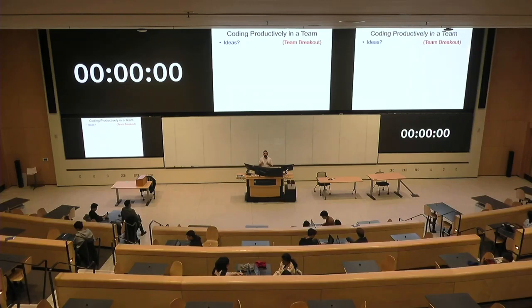So one of the most basic things is to communicate. Make sure that you are meeting regularly, to understand what each team member is doing, and have an agreement on the task allocation up front. Now, we are working in an agile environment, so sometimes planning is hard from the beginning. But if we have a little bit of planning, a little bit of an idea of what each team member is doing, we can revisit this in a week or two, once we're approaching the deadline, see how things are going, and then reiterate and redistribute the tasks depending on how things are going.